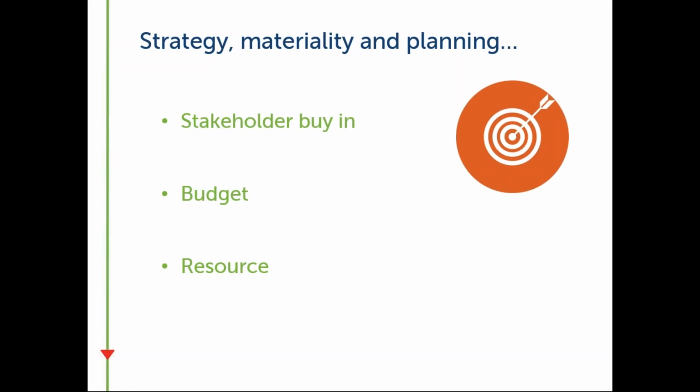Budget is of course crucial, not only to begin the project, but to have in mind when scoping the project. So knowing your budget will help you to manage your expectations and also look at the potential configurations and enhancements. Regarding resource, specifically human resource, we found here that an enterprise EHS system requires on average 2 to 3 full-time employees in order to successfully manage the tool. And involved in this resource, you will also need to include IT, especially during the implementation, and think about ongoing requirements around the kind of reporting periods, for example.